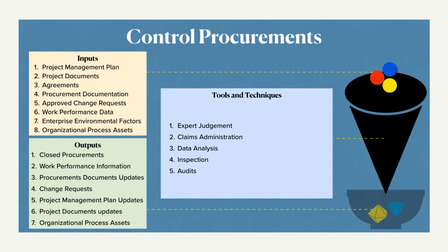At the beginning of the procurement agreement itself, both buyer and seller agree that if in future we get a situation like claims administration, we will go to some XYZ third party, and whatever he tells us to do, we will do it. Such alternate dispute resolution techniques are usually administered.